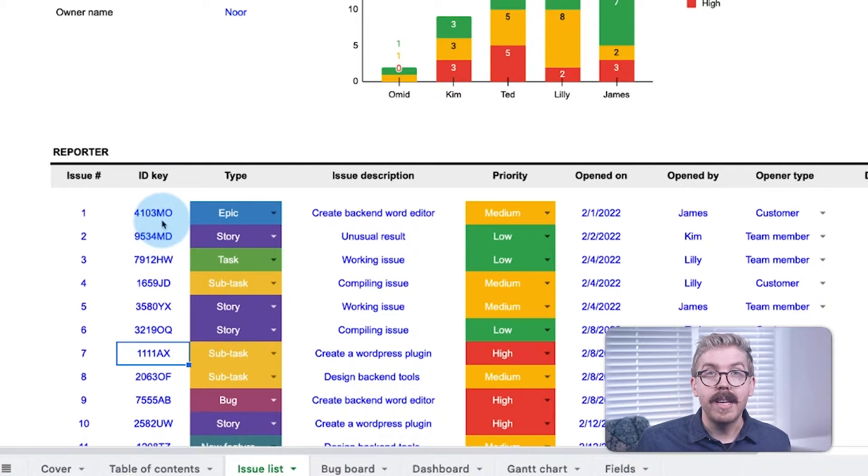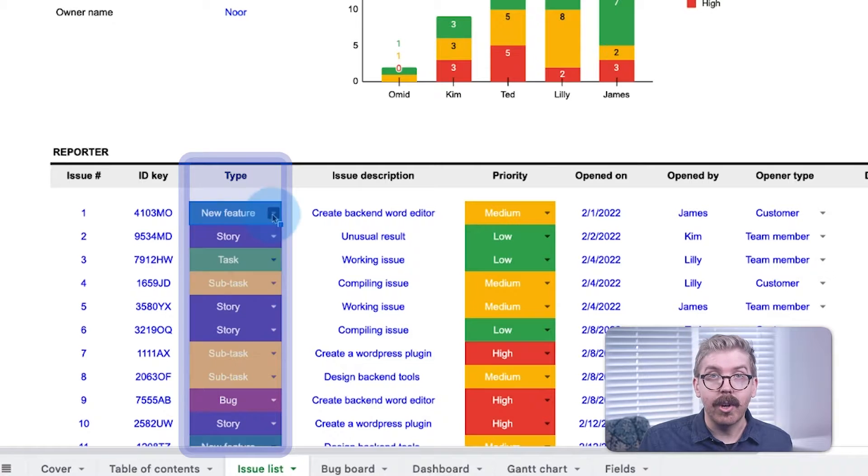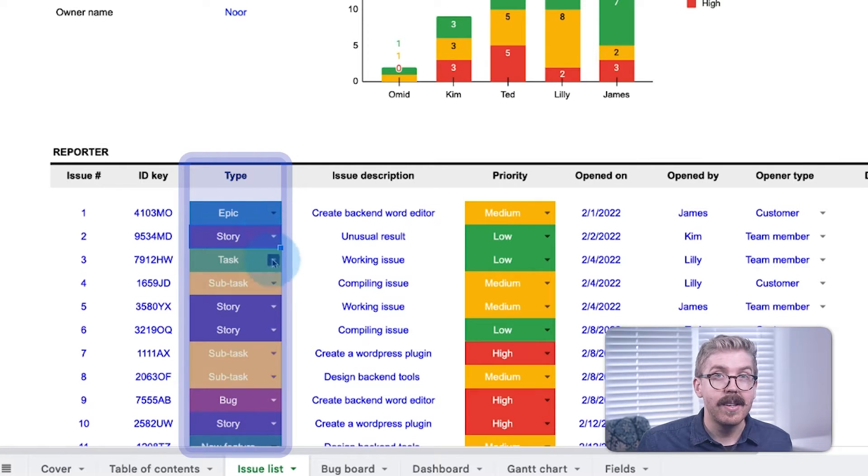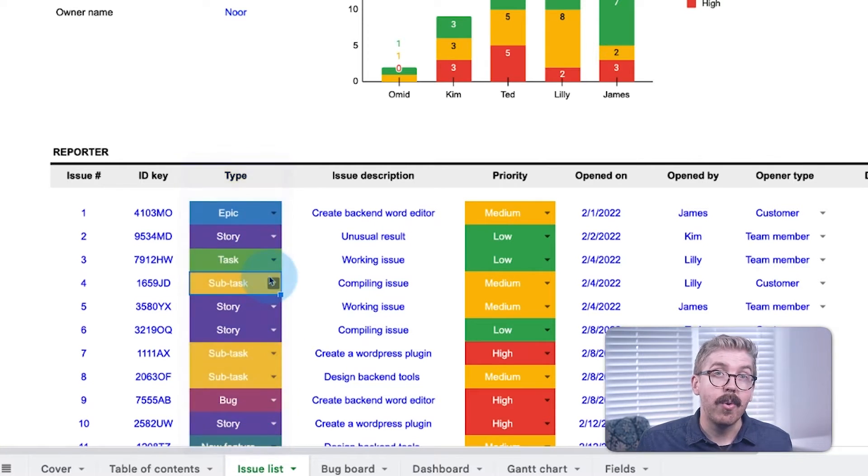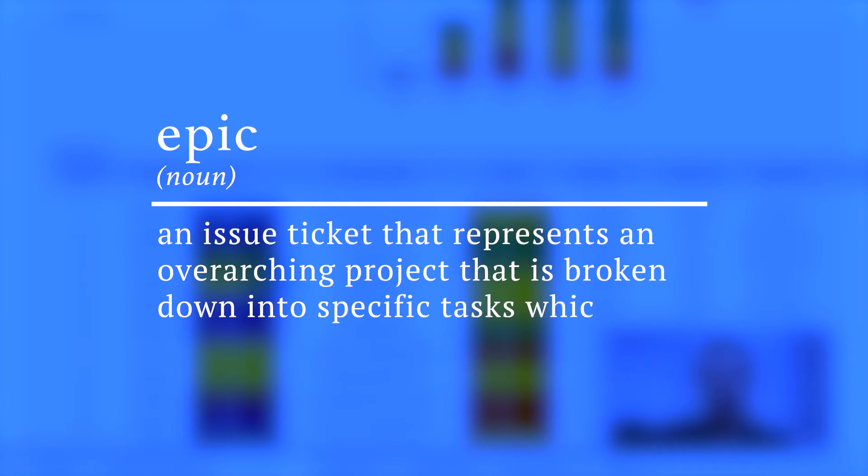Then, its type is listed, whether it's a bug, new feature, task, subtask, story, or epic, which is an Issue Ticket that represents an overarching project that is broken down into specific tasks that are called user stories.